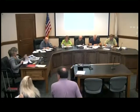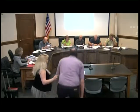Next one is 242441, COC request for 51 Long Pasture Road. So this one, I guess we're good. I did not review, and as you know, 51 Long Pasture is from some time ago. This house actually has a PCOC for the structure on the lot, but the PCOC is very specific to only the house, and that is because also constructed on the property is a wetland crossing and compensatory storage for filling a bordering land subject to flooding.